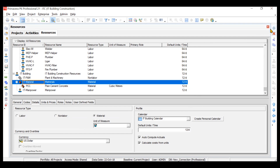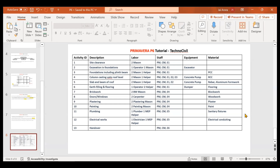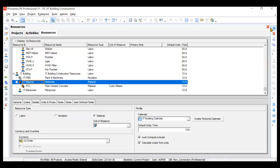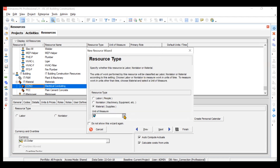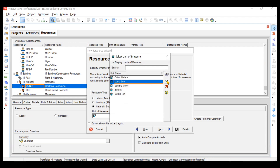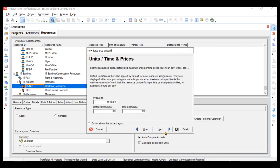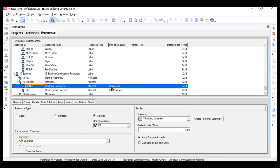Similarly, we'll create one more material — electrical conduiting. We'll click add, write ID as 'COD,' and resource name as 'Electrical Conduiting.' We'll go to next — it is material, and the unit of measurement will be lump sum. We'll take the price as 15,000 rupees per lump sum. We'll click next and finish. Our second resource, electrical conduiting, is also created. This is how we create materials.